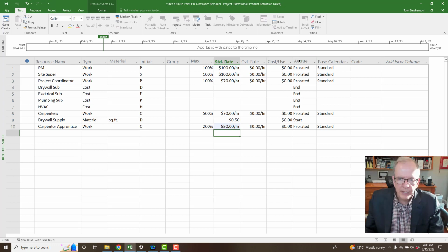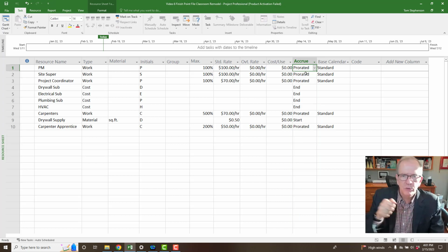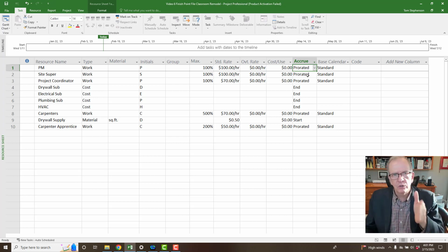You notice over here, there is a crew. And you notice there's 3 things that we could choose from: start, prorated, and end. This I'll show you, which we didn't talk about in the previous video. This is how the money will be paid out. And if we're going to do a cash flow report, it's very helpful if we display how that is going to be paid. So prorated would be like as soon as they're doing the work, they get paid on an ongoing basis. That's probably best to put if you're paying hourly, prorated, because that's pretty close to every 2 weeks. That's going to be as close as you're going to get.